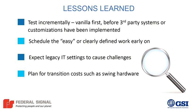Maybe if we learned a little bit about that beforehand, it would have saved us some time, but we did a good job. And we would have budgeted some money for it. Right. So that would have been good to know. Yep. We would have thought that you should put all the environments closer to each other, right, especially if you're trying to cut over in such a short weekend.